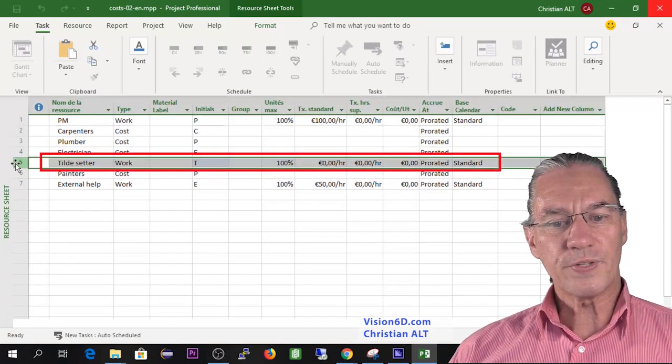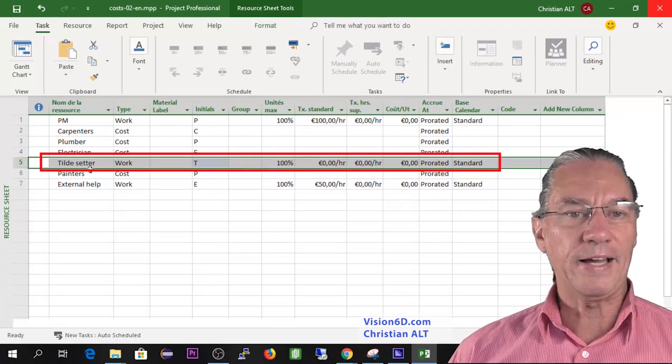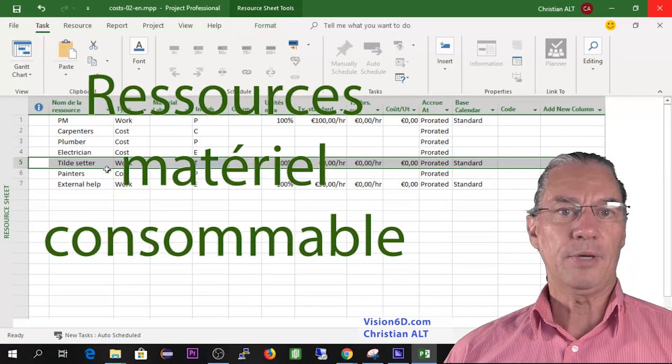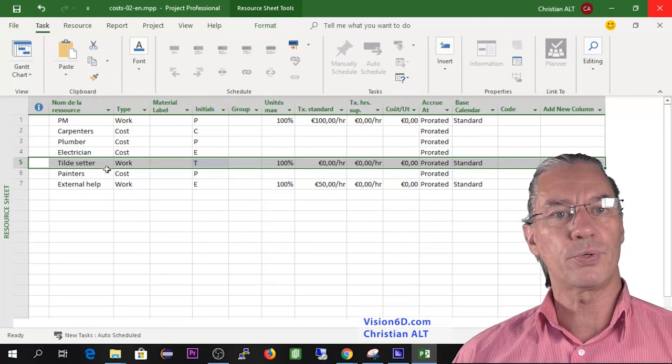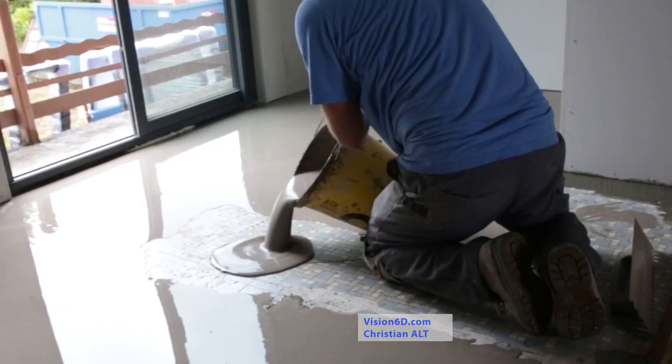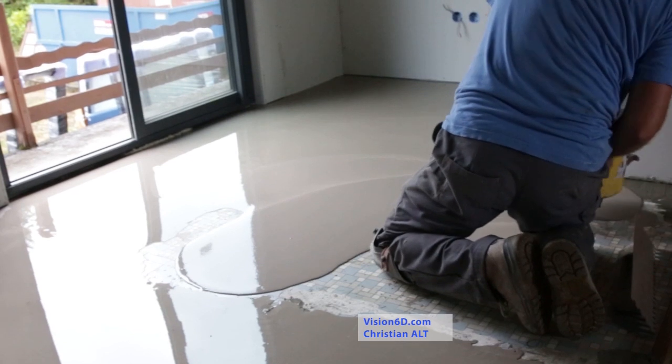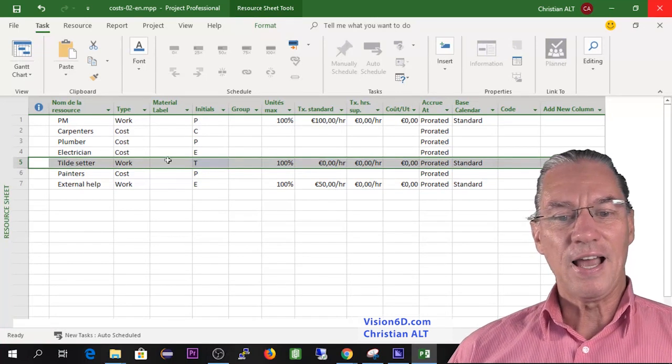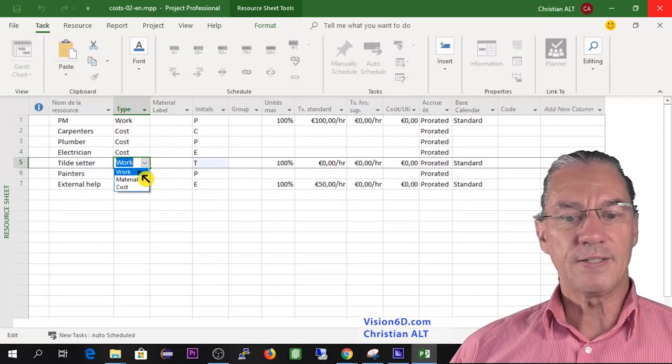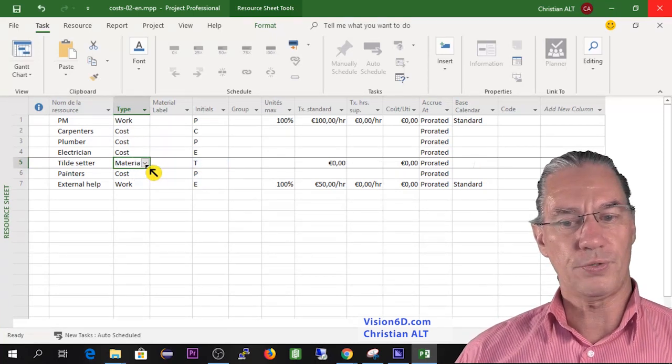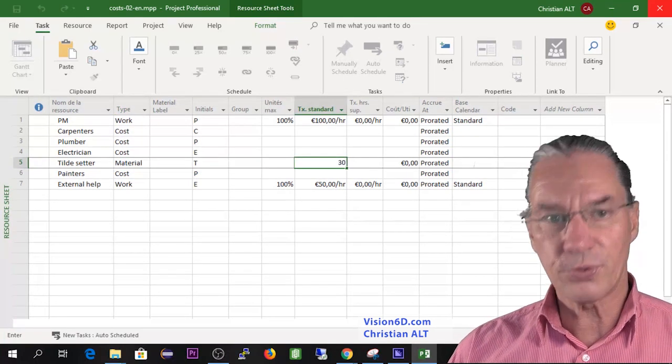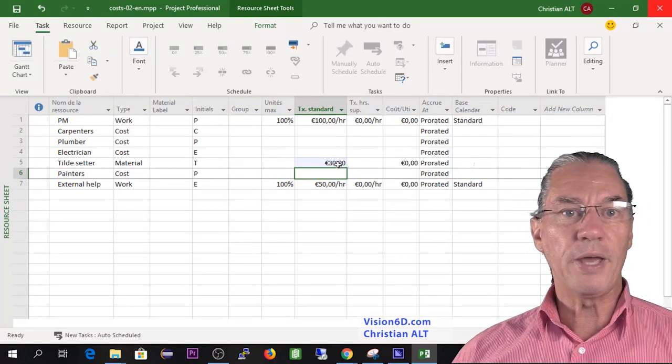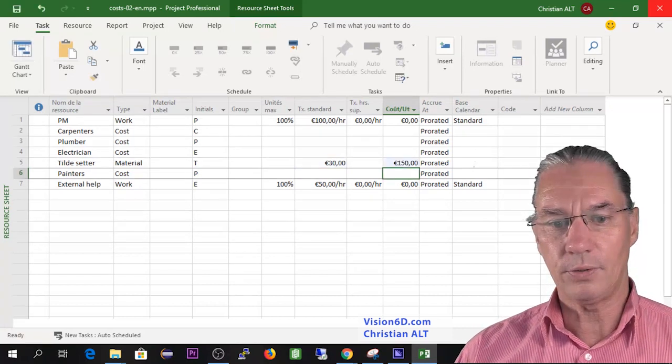There is one resource I haven't spoken about: the tile setters. The tile setters are particular because they said they are going to charge me 30 euros per square meter that they put of tiles and an additional flat rate for the start, for the first leveling of the floor. For this, it's not a work resource, it's really a material resource in the sense that there is a cost per square meter. They are going to charge me 30 euros per square meter of tiles and 150 euros additional for the basement.